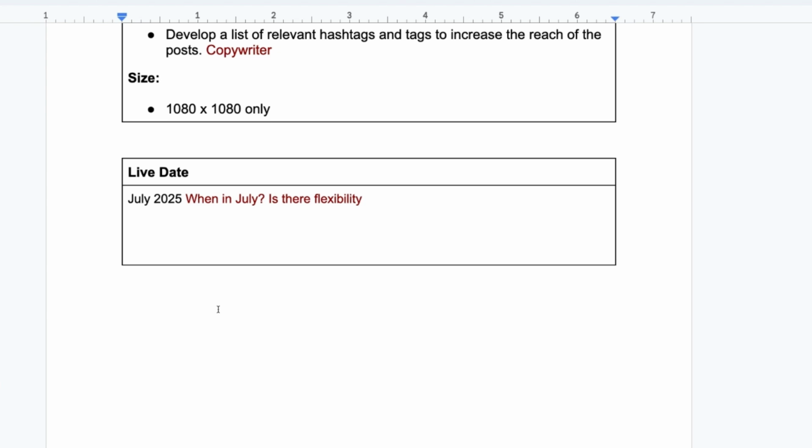So when I'm putting the timeline together, then I know, okay, these clients need 2 days to turn around feedback, for example. Turnaround time. I would also ask, who is the key approver? It's always useful to know who is the stakeholder who is going to be approving. Is it a number of different people? Is it just one person?